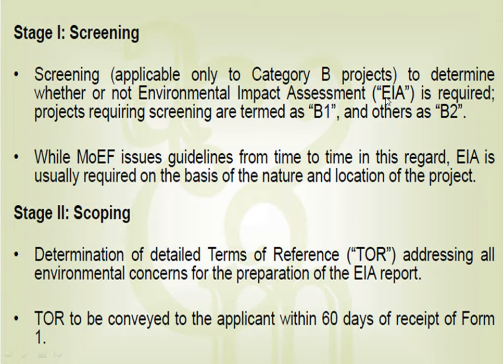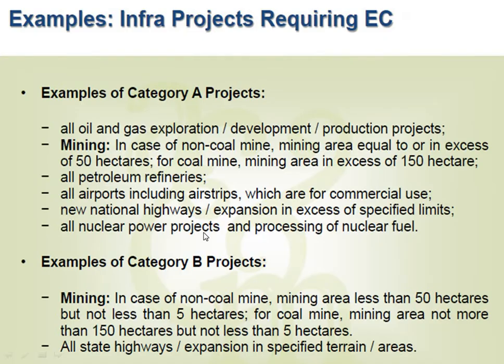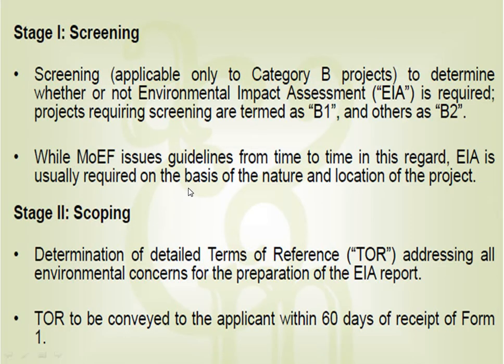Screening decides whether an environmental impact assessment is required. Those requiring environmental assessment are called B1, and the others are B2. So only for Category B will we have the options. These Category B projects have the option for screening.